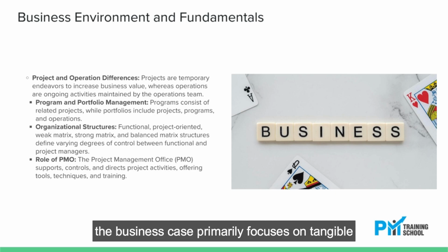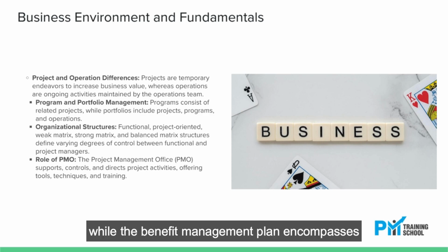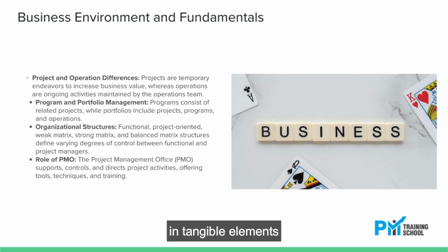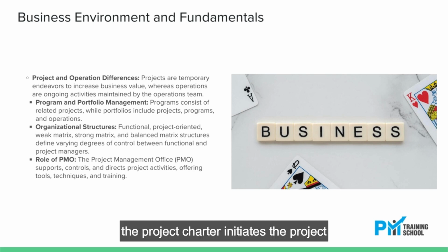The business case primarily focuses on tangible monetary aspects, while the benefit management plan encompasses intangible elements. Both documents are part of the pre-project activities. The project charter initiates the project, serving as the first document. It requires approval from the sponsor, granting the project manager the authority to execute the project.